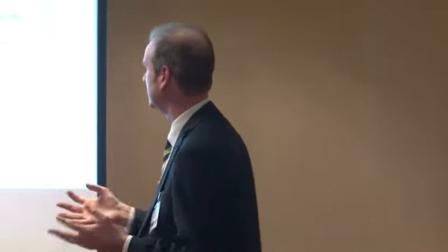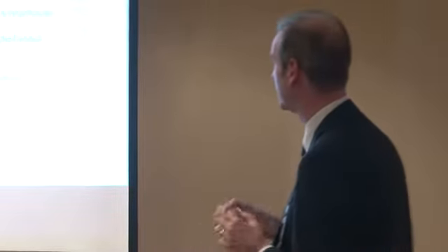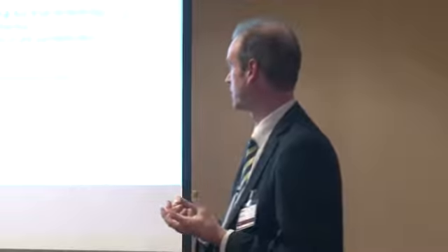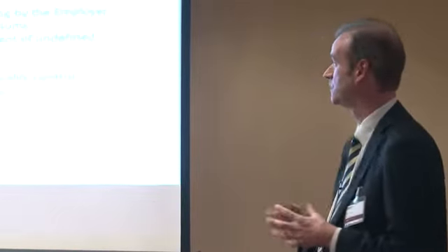Other parts, dates by which work will be ready for testing by the employer, work contained in defined provisional sums, and I would also recommend actually putting in activities representing the likely work content of undefined provisional sums. You're not actually required, or normally required, by particular forms of contract to show undefined provisional sums, the work content on your programme. But if it is something that is likely to be affecting your programme, well, include it.